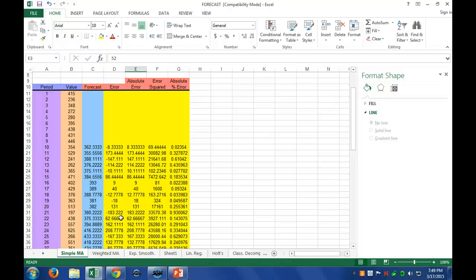It's called earned value management, and it's a way to track where you're at on a project. Say I'm building 10 houses, and I built 2 of them already, so I'm 20% done. But it took me 3 weeks to build them, so I'm predicting it's going to take me 15 weeks.